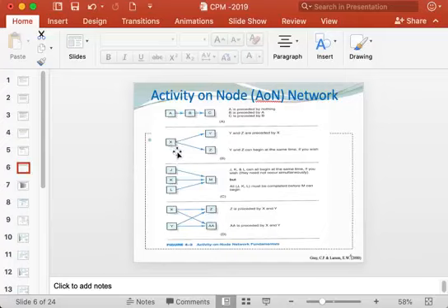So you can see the identification numbers used in these two activities are those letters which are coming after X. Okay, so that way you can consider that these two activities which are following this activity have larger numbers.